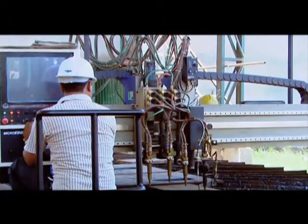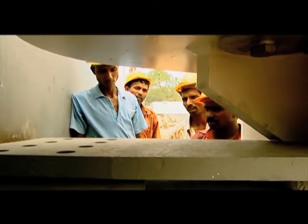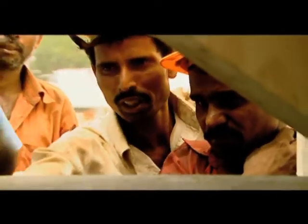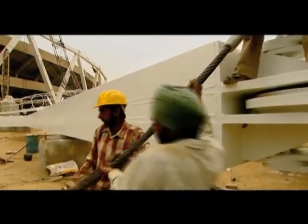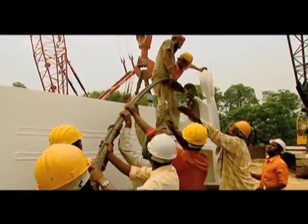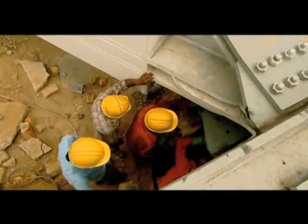The biggest hurdle crossed was that of matching the head plates of the LCR and UCR. An accuracy of 1 millimeter had been achieved, but the German consultant wanted an accuracy of 0 millimeter. In the end, 920 meters of the LCR and UCR were achieved with 0 mm accuracy.